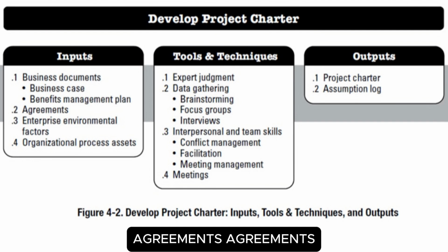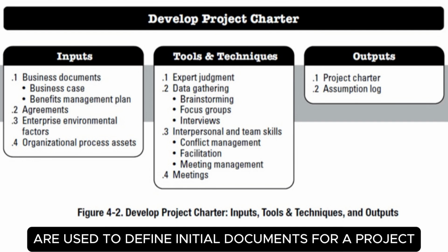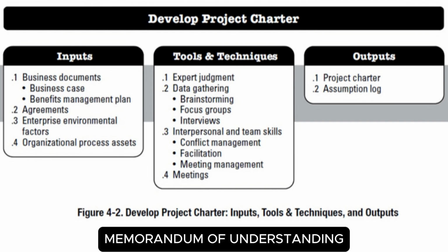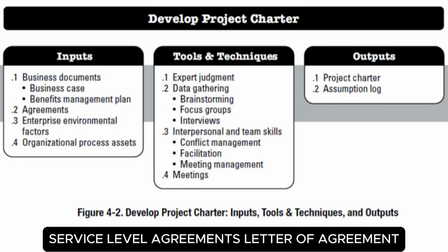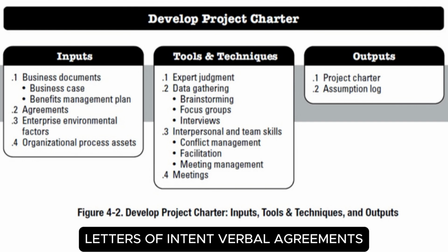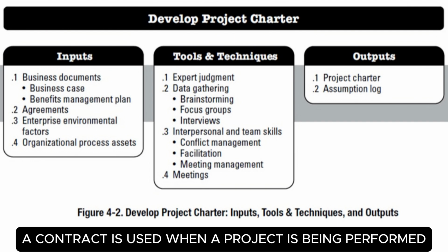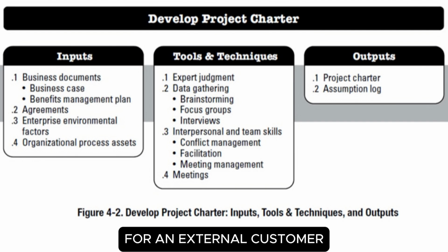Agreements. Agreements are used to define initial documents for a project. Agreements may take the form of contracts, memorandum of understanding, service level agreements, letter of agreement, letter of intent, verbal agreements, email, or other written agreements. Typically, a contract is used when a project is being performed for an external customer.